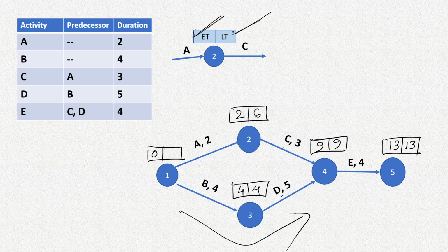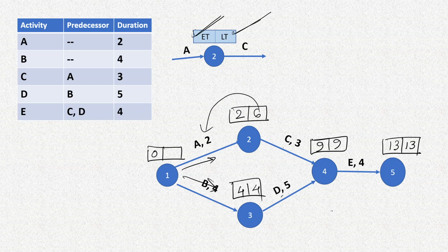This is going to be this one, because here these numbers and these numbers are different. Here these numbers are same, and here the numbers are different. And after that, when we come back to the first node, we'll have to look at both these arrows coming out of the node, and we'll have to take the minimum of them, and that will be given by 6 minus 2, that is 4, and 4 minus 4, that is 0, and the minimum is 0, therefore it is 0.